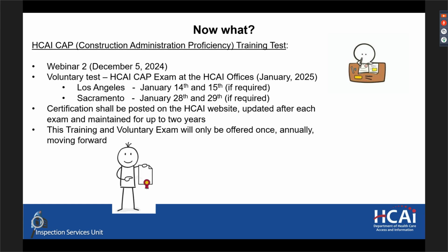Let's see if there is any other question. Here is another question. Does the current set to be kept and maintained on site include concurred NMAs? Yes, it should. One thing I've seen project teams do is take concurred NMAs and put them in front of the sheet that may have been modified by that NMA. So if an NMA has a sketch that modifies sheet A121, like a section of the A121 plan got changed by an NMA, you can fold that concurred NMA on top of that plan.